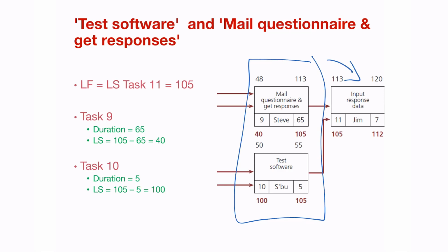In this case, calculating back, it finishes at 105 days. Both take 5 days, so it is 105 minus 5 equals 100 days.